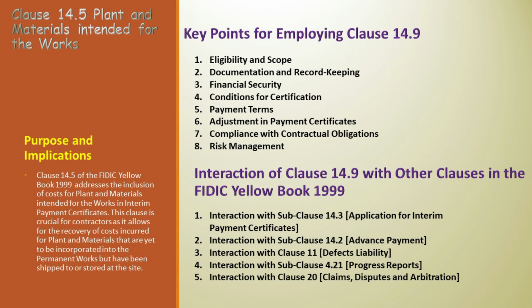Adjustment in payment certificates. Prepare for adjustments. Reduction in certificate: expect a reduction in the payment certificate when these plant and materials are included in the contract value under subclause 14.3.